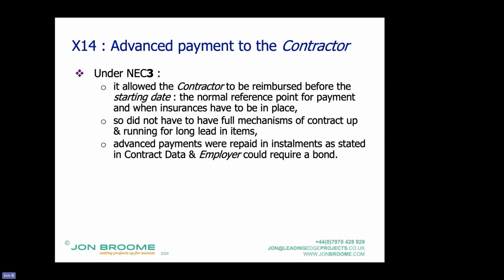And then advance payments were repaid in instalments as stated in the contract data, and normally after the starting date. So once the contract mechanisms had got going, the employer could require a bond, which we'll come to, as a surety that if the contractor went bust, they would get the money back that they paid for it.